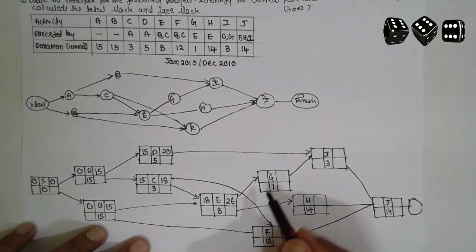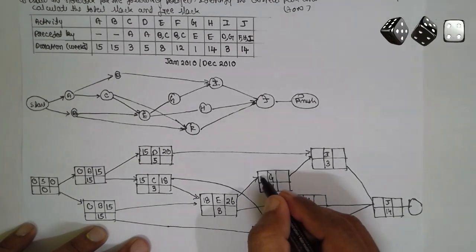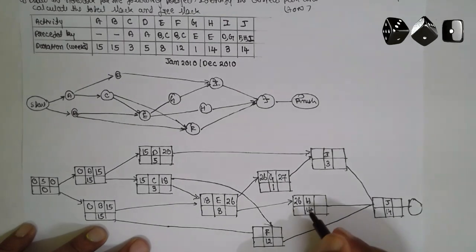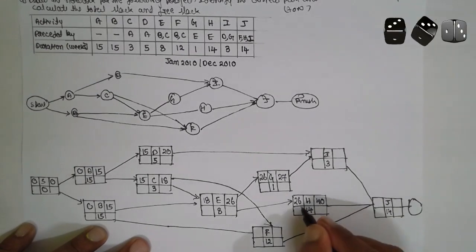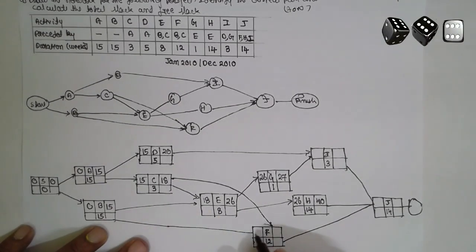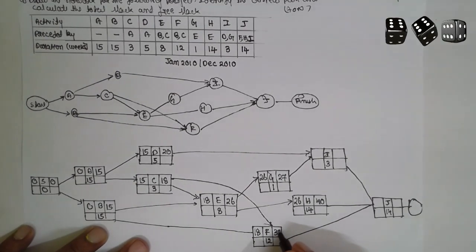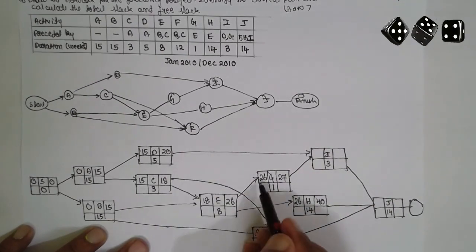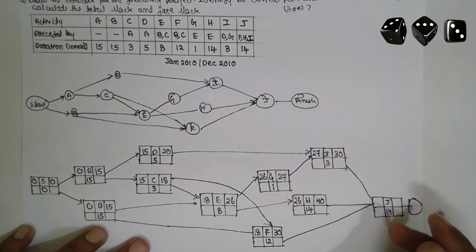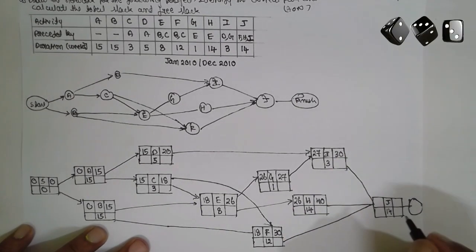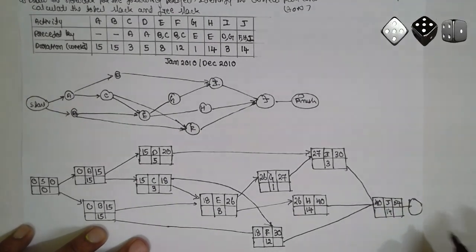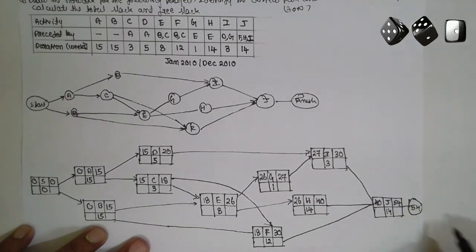26 — further here, move 26. 26 plus 1 equals 27. Move here, it is 26. 26 plus 14 equals 40. For F, 15 or 18 — select the larger value 18. 18 plus 12 equals 30. At I, it will be 20 or 27 — select the larger value 27. 27 plus 3 equals 30. Here select the larger: 40 or 30, so 40. Write 40. 40 plus 14 equals 54.